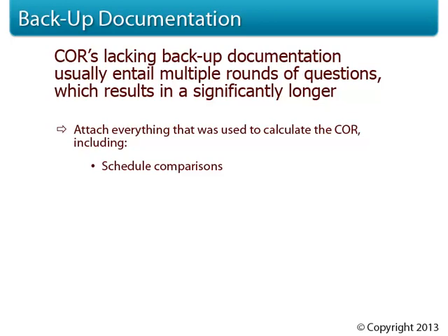Further, that statement could very well hold up your payment. The owner may not have a problem at all with the value of the change order request itself, but if they take exception to the time extension requested, that will be reason enough to hold up approval. Time extensions are difficult to analyze, but if they're valid, they can be proven. And if they're valid, you have to prove them.